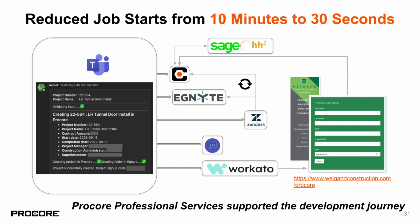So it's going to go out to Procore, it's going to create the job. In Procore, we have it set up with the Sage HH2 synchronization engine, so it will go into Sage and create it and move all the cost codes and set it up as a real job over there as well. Then once that's all complete, it goes to Ignite, takes our template, and creates a new folder for it there.